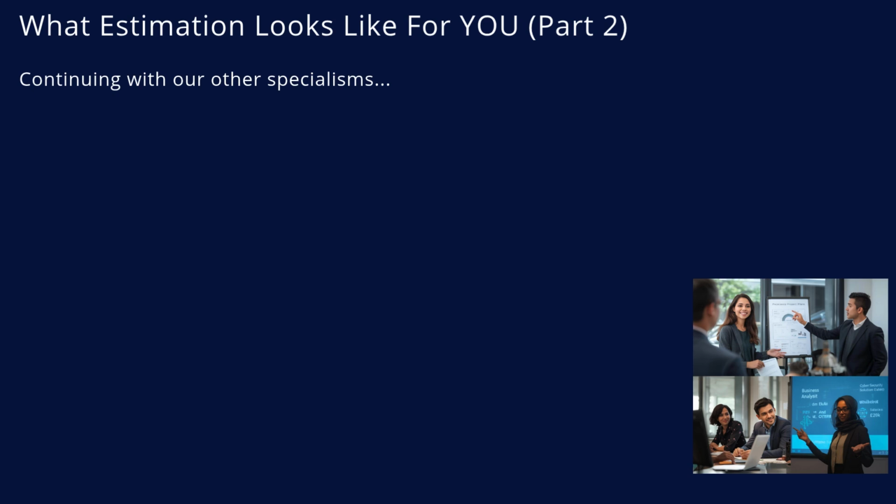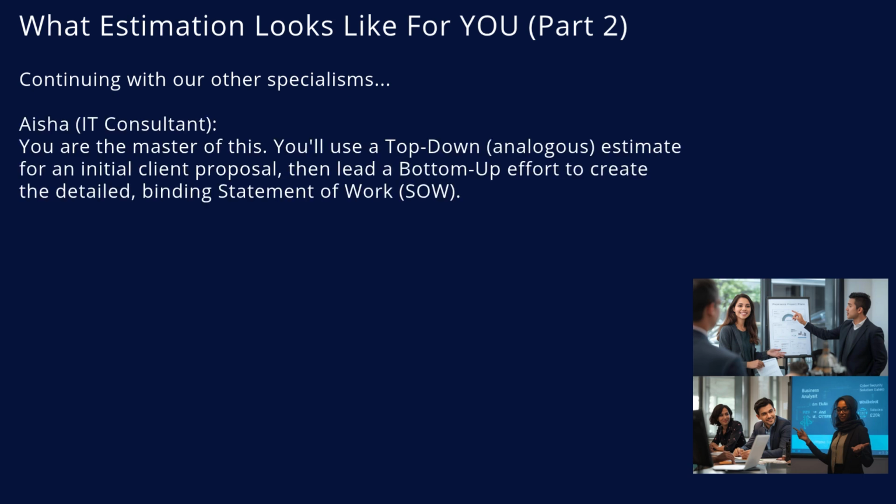Continuing with our other pathways. Aisha, as our IT consultant, you are the master of this. You'll use different techniques at different times. You might use a top-down, analogous estimate to give a client a quick, ballpark cost in an early meeting. But then, your main job is to lead the whole team to create a highly detailed, bottom-up estimate that will become the formal, legally binding statement of work.